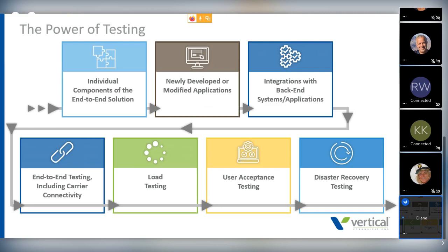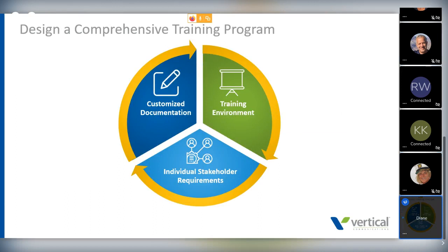Now, one other point before we leave testing: hopefully this platform is going to allow you to grow with it and to add enhancements as you move forward. So, in my mind, it's extremely important to put this philosophy of testing into practice as you move to add applications, as you move to add new enhancements. Having a test environment where you can do all those things is very critical to any implementation and ongoing support for the system. Okay, let's look at training.